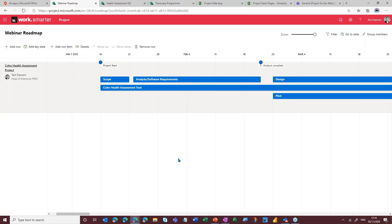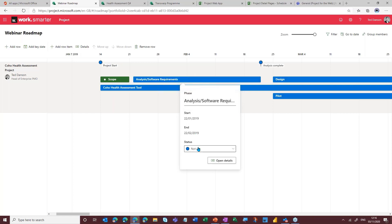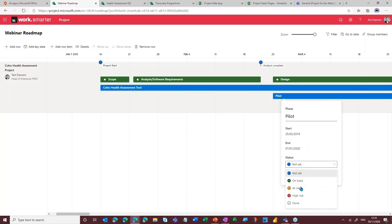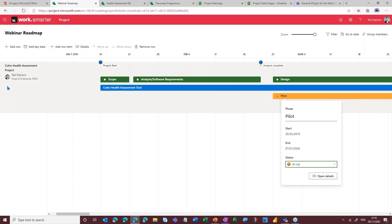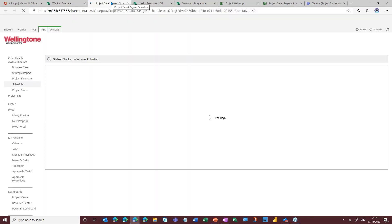This is all very well and good — we've brought the data across. And if the data now changes in the plan and we then refresh the roadmap, this data here is also going to be refreshed. One of the great things about Roadmap is the fact that it gives the end user the ability to go in and flag the status of those specific tasks. So scope we'll say is on track, analysis and requirements gathering is on track — in fact, let's say everything's on track aside from the pilot, which we'll say is at risk. And if I do want to go back to the plan, I can either navigate back to the open tab or click on open details.